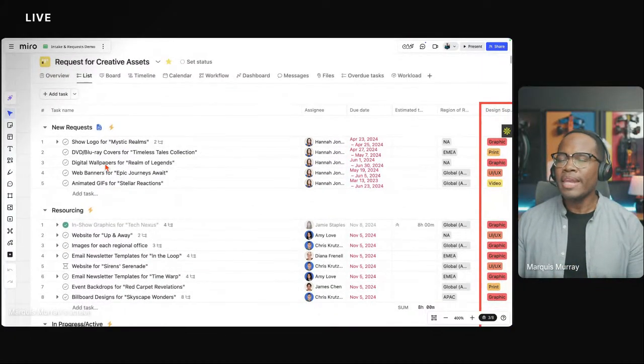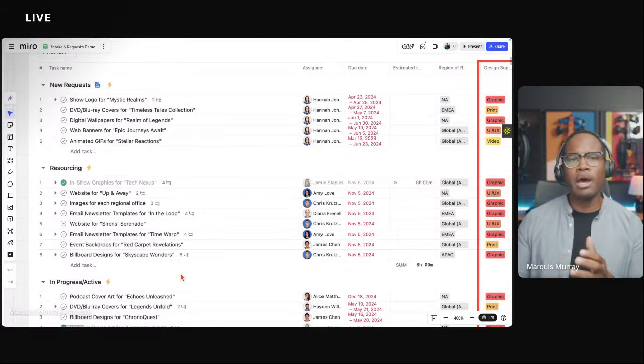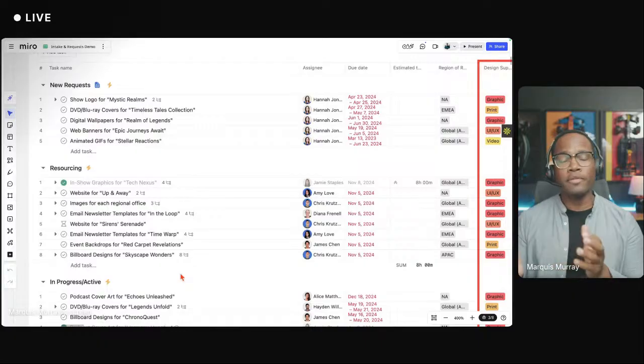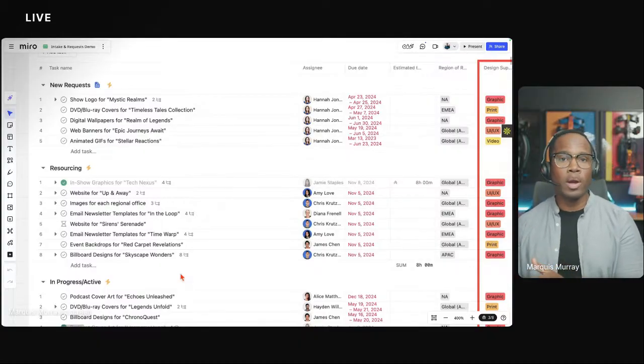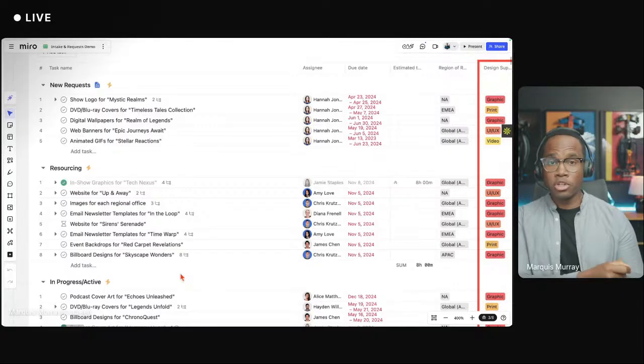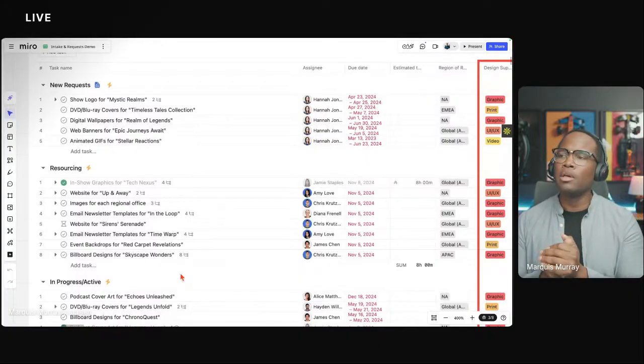Now we can do a few things. We can name these sections to be the different phases that a project or a campaign would need to go through, because keep in mind, we can create different templates for the different types of requests that would come through. If we have a capital project that needs to go through phases or stage gates, 1 through 10, we can have a template just for that. And when this type of request comes through, because we can ask that information on the form, we can say use this template, add it to this portfolio or set of nested portfolios.